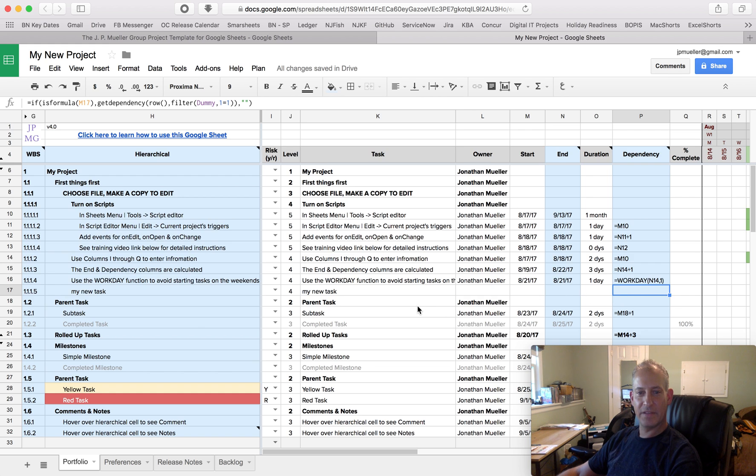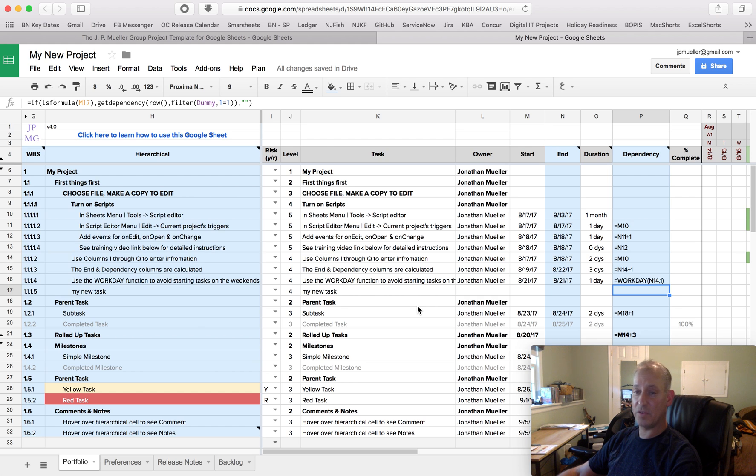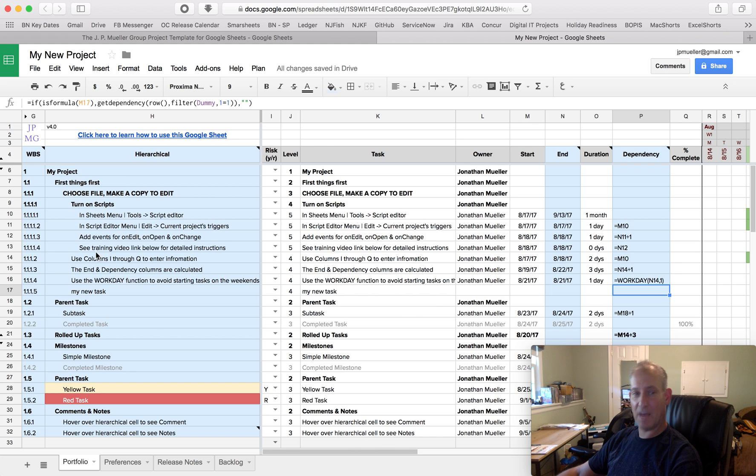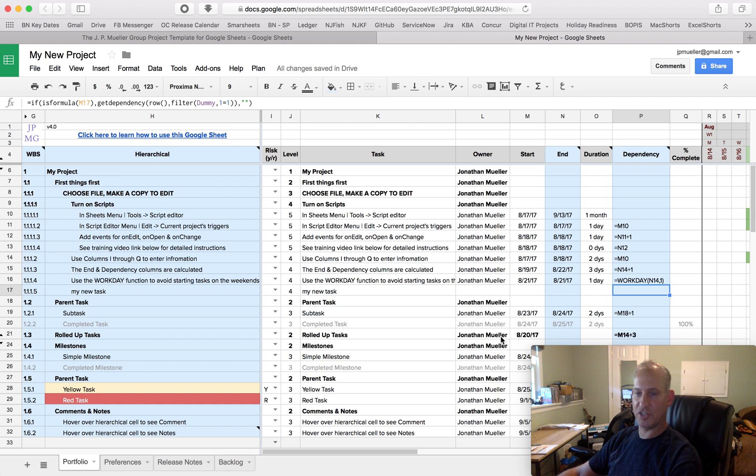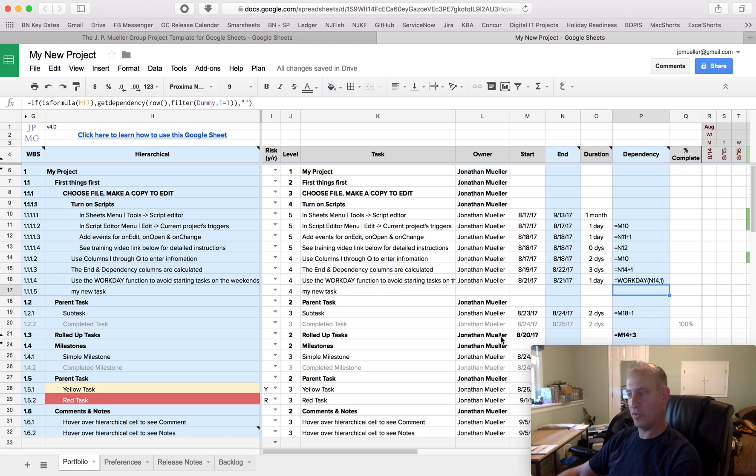So that's it. Make sure you do that every time. If you don't do it and you start using the spreadsheet, you might have to copy those formulas down. Unhide them and copy them down to recover from the rows that you may have inserted that don't have the functions. Or you may have to just start a job fresh. Enjoy. I hope you liked it.